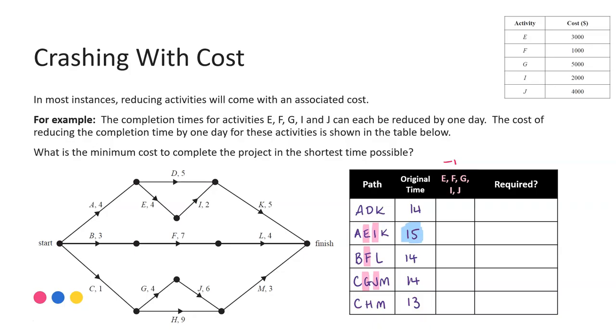So now going through and making those reductions. First pathway, no change, it remains at 14. Second pathway, I have two activities highlighted. So I can reduce by one for each of those, a total of two days saved. So 15 minus two brings me to 13. Third pathway, just the one activity being reduced there, again by one day. So 14 minus one, 13. Fourth pathway, we have two activities. So again minus two brings that to 12. And the final pathway, no reductions, so that remains at 13.